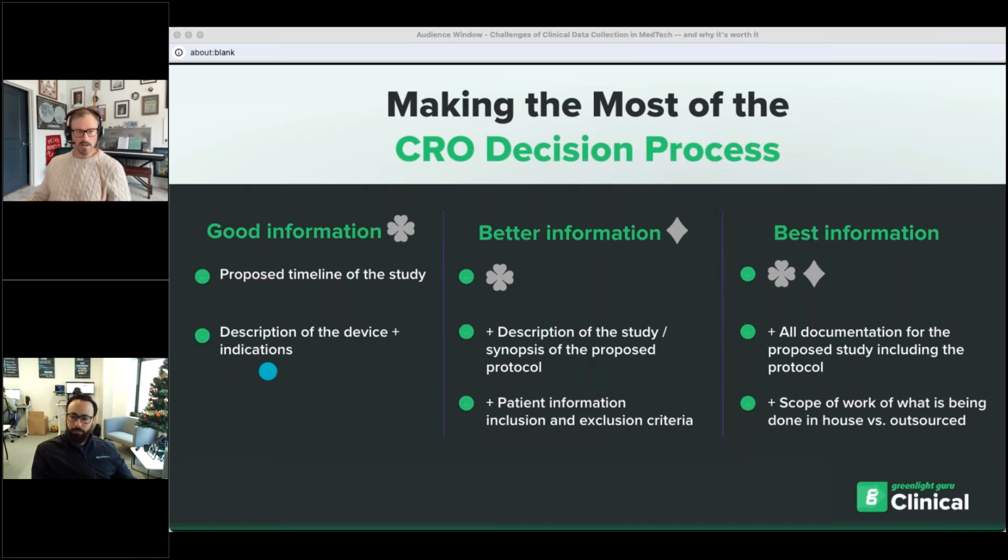You may not have a protocol yet, that's okay. Better is going to look like a more refined description of the study. You might even have a draft protocol, inclusion, exclusion. Maybe you have some case report forms drafted up. And then best case, and again, may not be achievable every time, but really having all the documentation for the proposed study, including the protocol, and very clearly having scoped out what you as the sponsor plan to handle in-house versus what you'll need outsourced and taken on by the CRO directly.